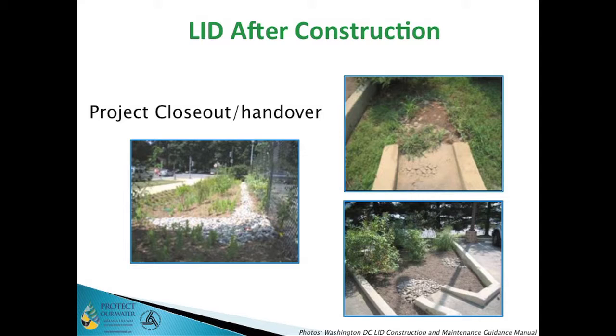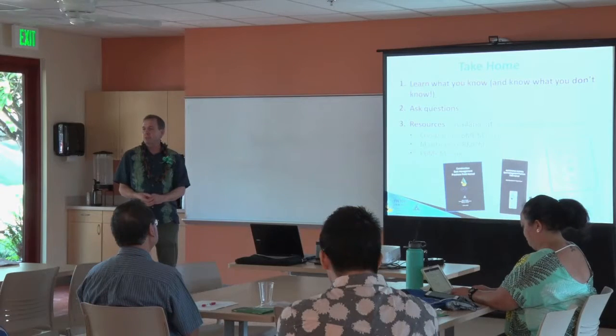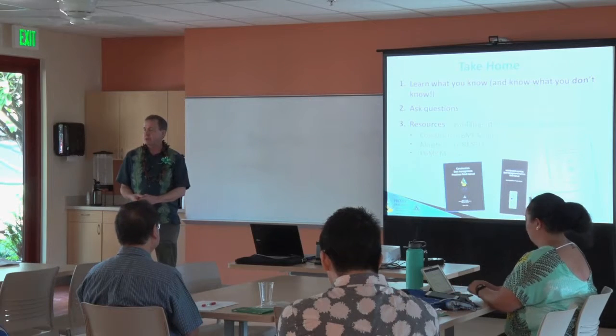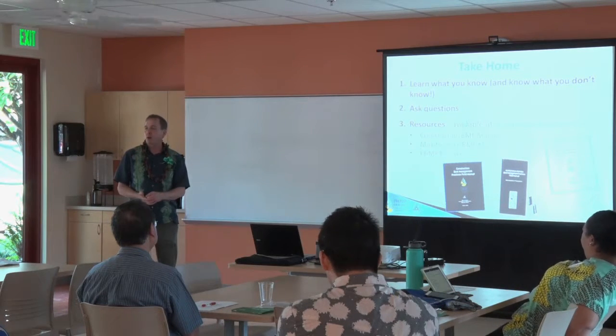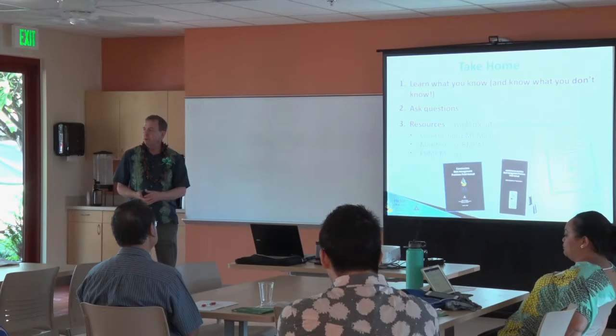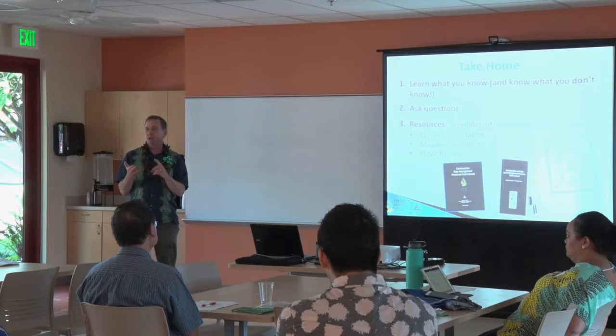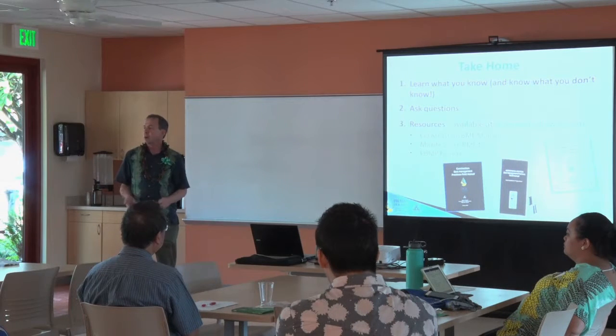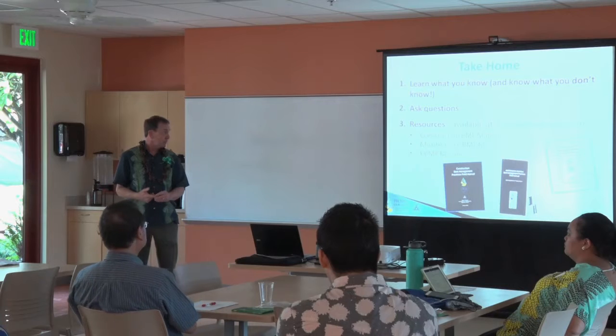The difficulty is some of it may be more important than you realize, like making sure that the soil in the spec is actually the soil that we got at the site. So don't be afraid to ask questions if there's something that doesn't look like what you think it should be. I think there's resources to reach out to ask for help as we all work together to learn and grow this process of how we select our sites, design our projects, build them, and then turn them over for operation and maintenance so that they continue to function as intended.